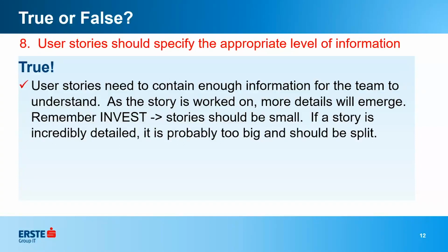And then remember the INVEST criteria: the stories should be small. So if you're getting into a ton of detail and you see that the acceptance criteria is getting really long, it's probably time to think about splitting that story. If you really feel all the acceptance criteria are necessary, it may need to be split. So just something to keep in mind.